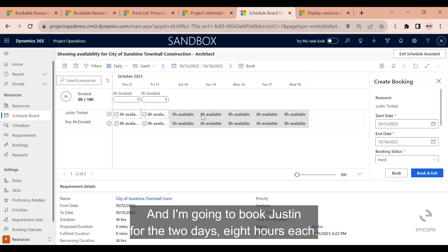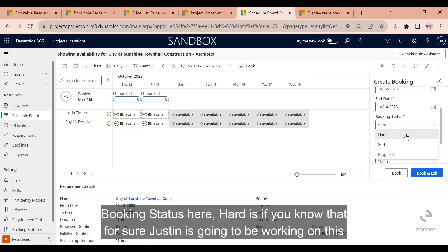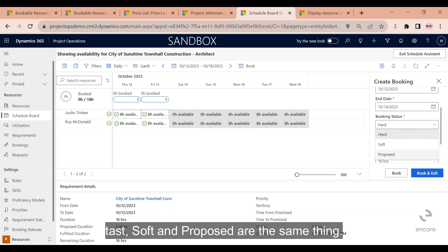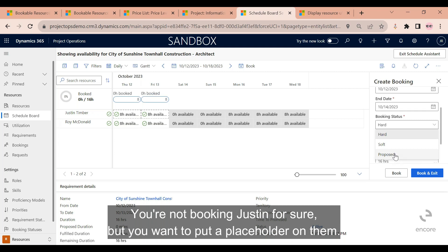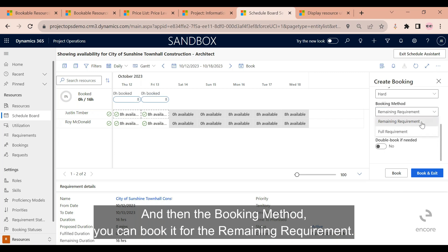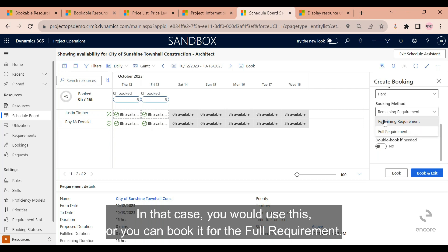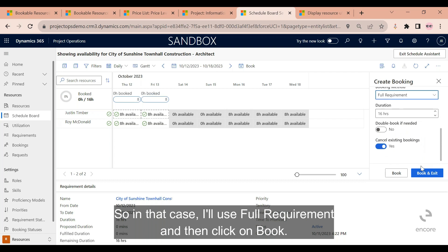The scheduler would select either Justin or Roy since both are available and can play the architect role. I'll select Justin Kimber. I can book him for two days, eight hours each, to fulfill the requirement. For booking status, 'Hard' means you're certain Justin will be working on this; 'Soft' puts a placeholder. For booking method, I can book for the remainder of the requirement, split it between resources, or book for the full requirement. I'll select 'Full Requirement' and click Book.